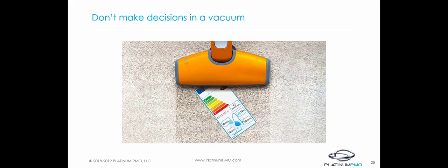Sometimes team members choose a way to solve a problem that has an impact on scope, often without even realizing it. Even adding a half a day of extra work to do something slightly different could have an exponential impact on the rest of your program. For example, if a designer decides to include some functionality on a site without discussing it with the developer, who knows what this could do to the overall scope without any investigation.